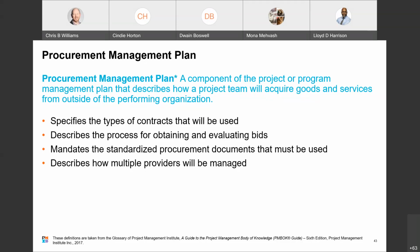So again, a small advertising agency may not be good at printing or photography, right? So they can procure it from the outside. The procurement management plan would outline the company's processes for soliciting and evaluating bids from competing service providers, and would specify how the management would schedule the contract work, schedule the payments to the providers for the work done, and evaluate the quality of the work.